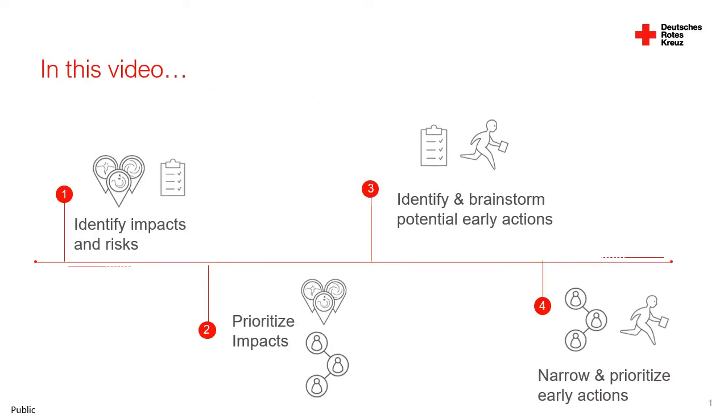This process includes identifying the impacts and the risks associated with a particular hazard, prioritizing those impacts, coming up with the early actions, and narrowing and eventually selecting the early actions that will be included in your protocol.